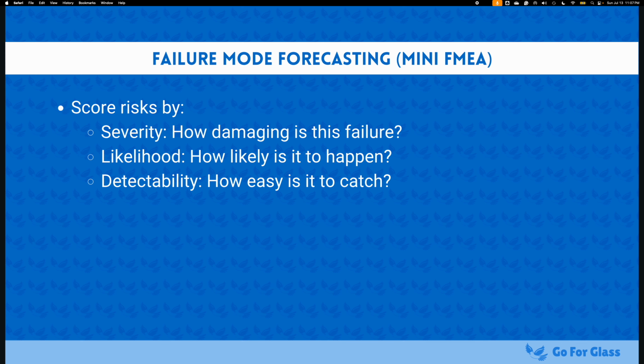That's fine. We're going to move into our action plan. And we'll say, okay, at this point, we're going to increase our need for revenue. Let's say that we underestimated gas by $30. So now we have to get $30 extra in revenue in order to break even. Not ideal, but detectability, it's really easy to see when we've hit the limit where we don't have enough money for gas.